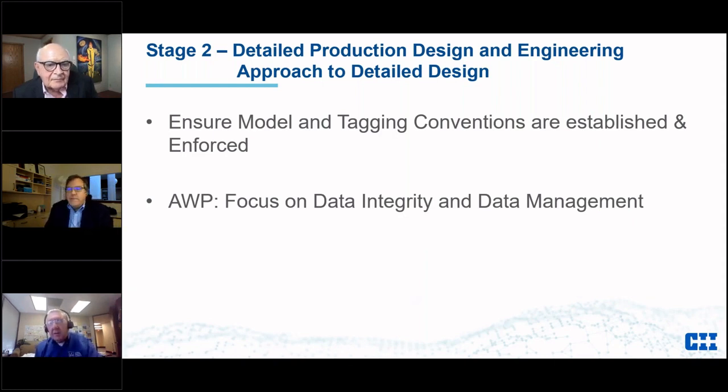The big thing about detailed design, as I had stated before, our company has mandated that our standard deliverable is an AWP compliant 3D model that will feed forward to support the last planner, the field planner, in developing their IWP work packages. So that's put a whole new spin on things. The 3D model is no longer a picture of what things are going to look like. The 3D model is the basis for planning the project and actually statusing the project.